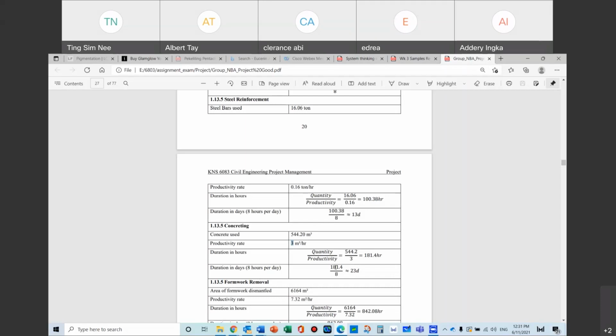So get everything up until this point, the result that you get from here is a Gantt chart and the estimates, correct enough. So this tool, you will put it in your procurement, the initial bit of the group project, okay? And then you will write your tendering method, and then you will write which method is better, and then you will write your procurement procedures, you know, like what time you need to submit the documents, where you need to fill and all that. So the procurement requirement, and then followed by what we call summary of tender, and that's it, you're done for your group project.